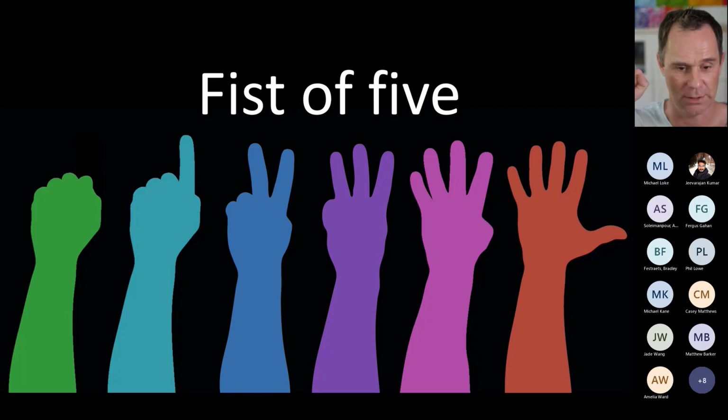So we start out with 0 fingers showing, which means I don't think we've got any chance on earth of getting all those 10 done in one sprint. In that case, we play Fist of Five, and everybody reveals their confidence level. 5: absolutely, no problem, we'd do that every day of the week. 4: yeah, pretty good chance, and so on down to 0, which means no hope.